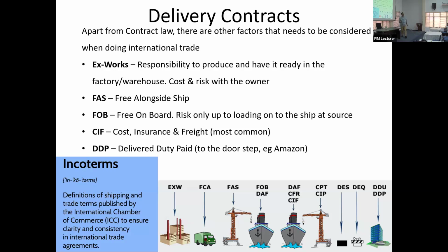Now this has its own challenges. I have made the mistake in the past where I priced a product on FOB basis. Actually, I should have priced it on CIF basis. I assumed the manufacturer would insure and send it, but he didn't.